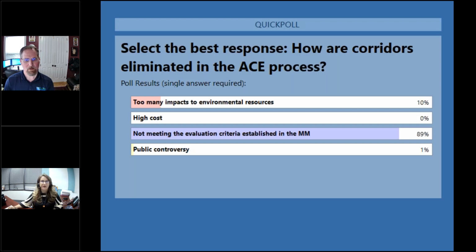The buffer can also cover the interchange area. So rather than having a narrow corridor width, you can select one that's large enough that it covers the potential interchange concepts you're looking into. And if you have more information, you've done a previous study that identified some initial corridors, and you have a really good idea of what your typical section is going to be, then maybe you don't need to increase it. I think we showed examples of that where it was a minimum of 1,000 feet.